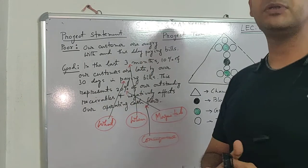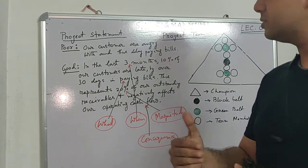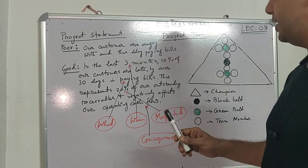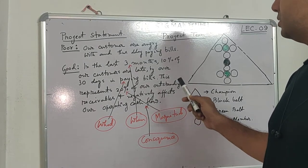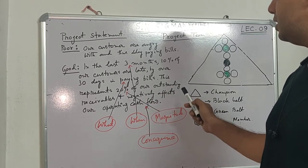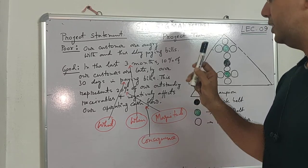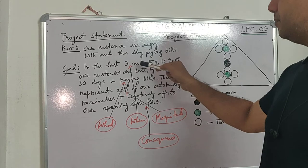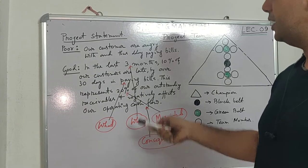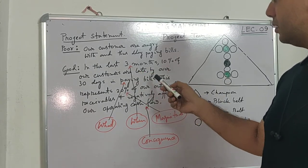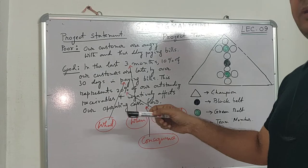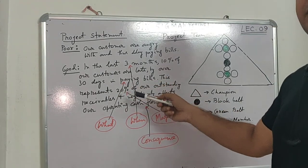Without data and specific values, a statement is not acceptable. A good project statement would be: 'In the last three months, 10% of our customers are late by over 30 days in paying bills. This represents 20% of our outstanding receivables and negatively affects our operating cash flow.' In this statement there is a time period — last three months — a customer scope — 10% of customers — and a clear main problem of delayed bill payment beyond 30 days.